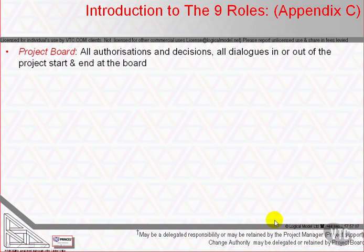The official manual says the project board is accountable to corporate or programme management for the success of the project, and has the authority to direct the project within the remit set by corporate and programme management and documented in the project mandate. The project board is responsible for communication between the project management team and stakeholders like corporate and programme management who are external to that team.